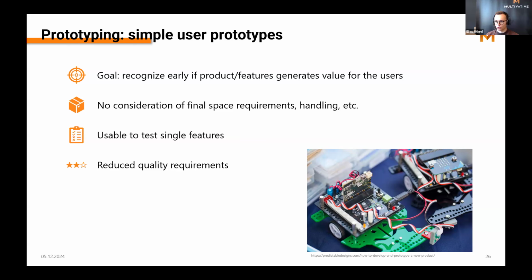And it's very important to take those prototypes and test them together with actual users. And we also do that in our practice, and it really helps to avoid unnecessary development time on features we thought would be helpful, but weren't really needed by the user in reality. And if you find that out after a few weeks, it's much better than finding that out a month later after you have implemented it in a final product.